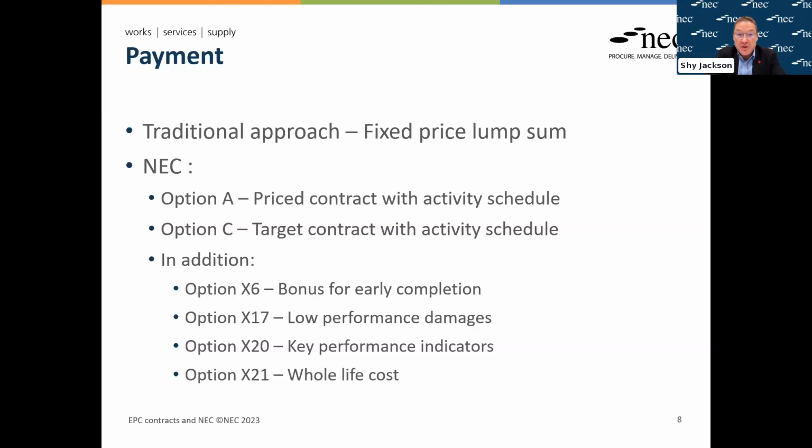But of course, NEC is not just about target cost. And recognizing that ultimately the commercial incentives drive performance, there are a few other options that can be put in place in order to create what I tend to think of as a more sophisticated approach to incentives. And that includes, first of all, option X6, bonus for early completion. Clients tend to focus more on the stick, the delay damages for delay, but sometimes I think there's a bit less consideration given to the carrot and possibly having a bonus for early completion.